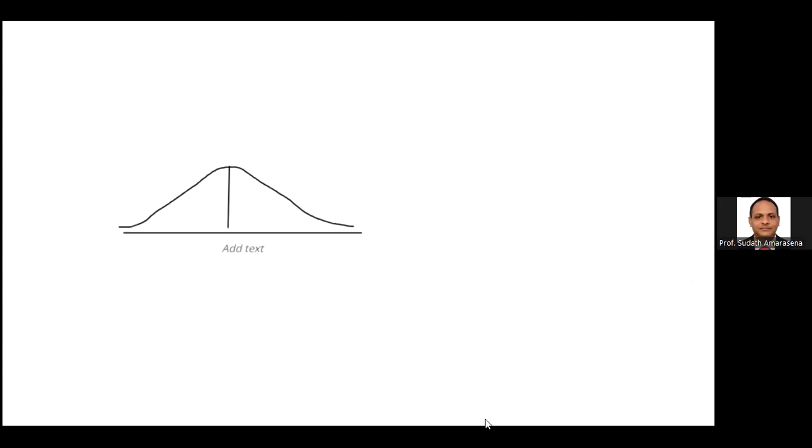The question asks to calculate the probability within 25 days and 20 days. First, I'd like to calculate within 25 days. The 25 is after the 23, right? Then we should identify the probability within 25 days. Normally, according to the normal distribution, from here to here the value is 0.5.